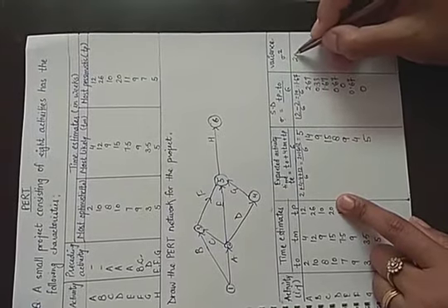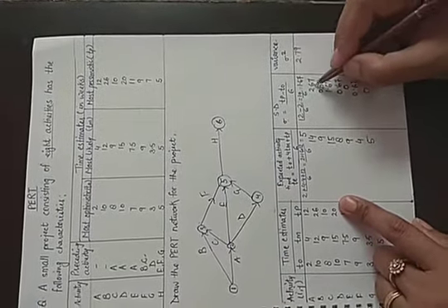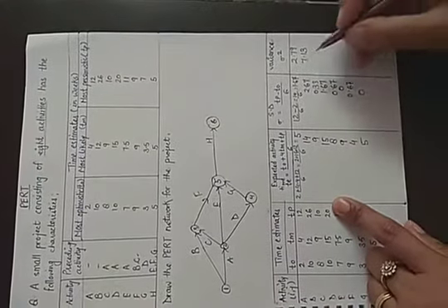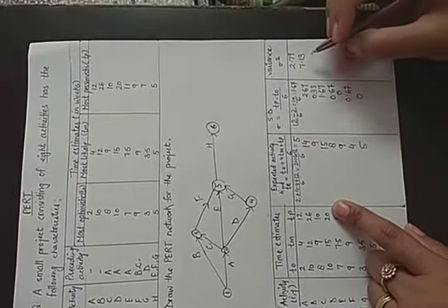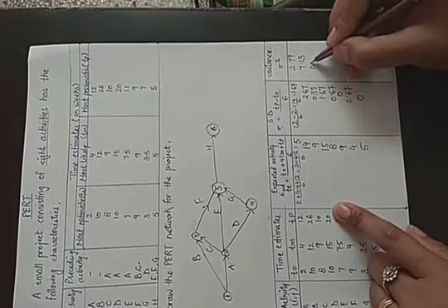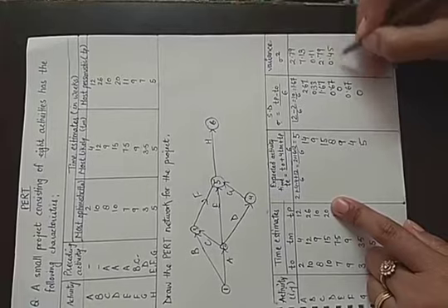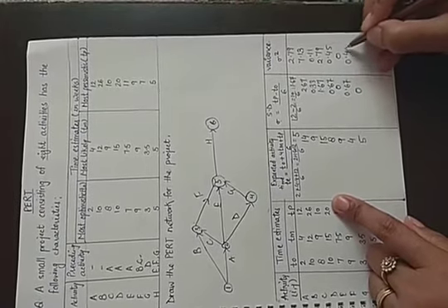Next, variance is equal to the square of the standard deviation, that is sigma square is equal to 1.67 whole square, that is 2.79. 2.67 whole square, that is 7.13. Similarly, you will square all of them. It will be 0.11, 2.79, 0.45, 0, 0.45 and 0.